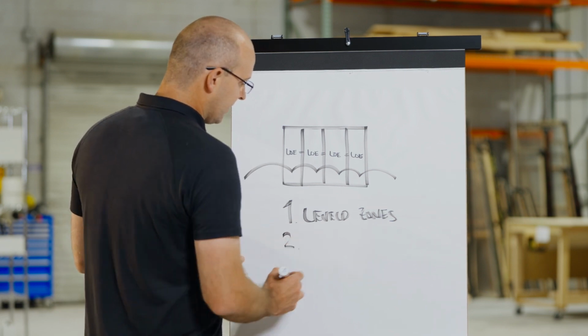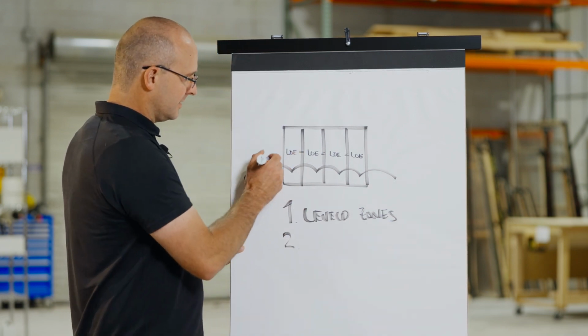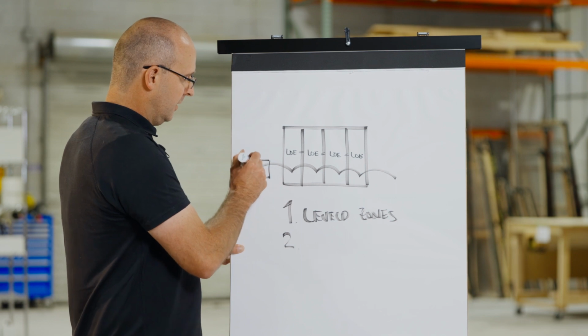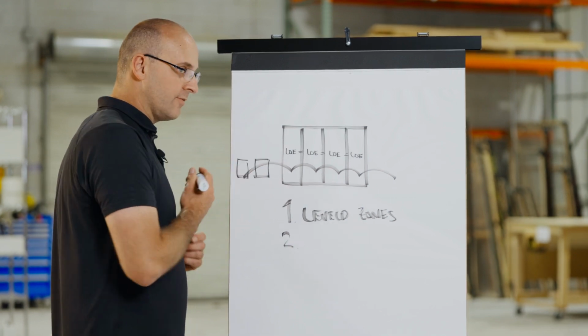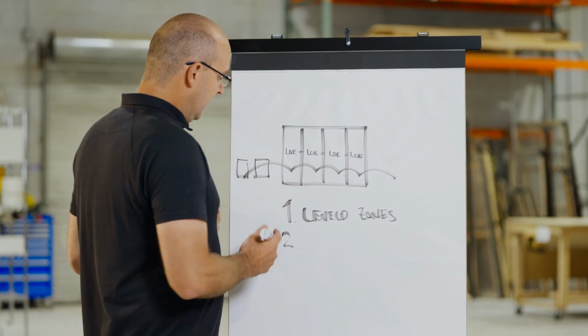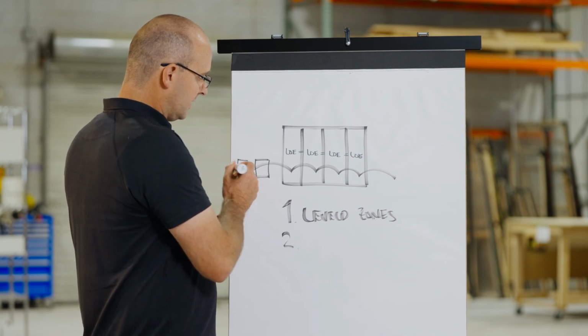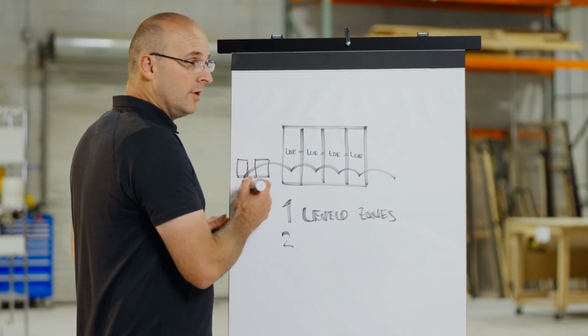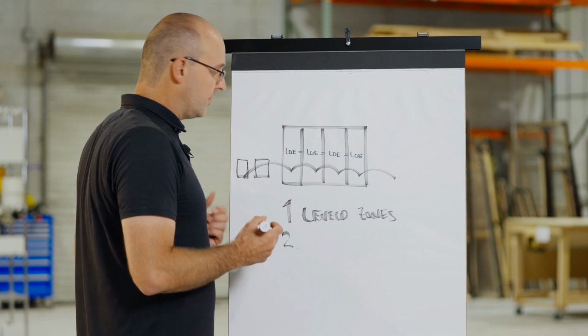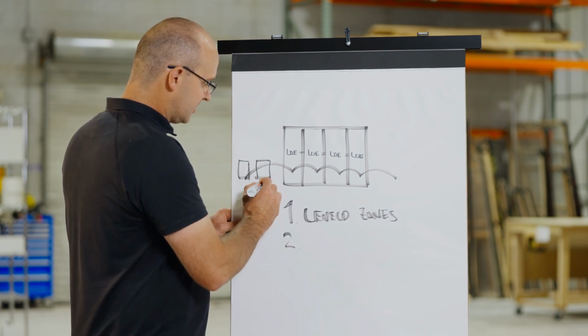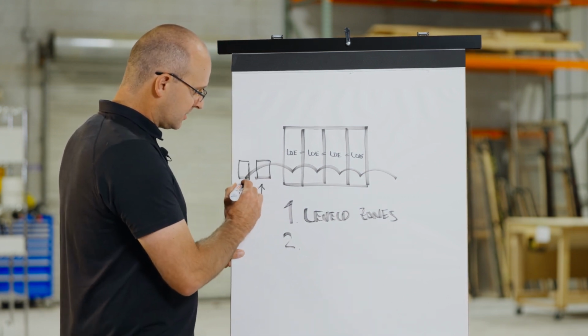Number two, the trades that are going into this, let's say that this is trade number one, trade number two, and then you have 3, 4, 5 respectively. If you have trades that are slower than the other, it will slow you down. You won't go any faster. Let's say that this trade can go decently fast, this one is slow.